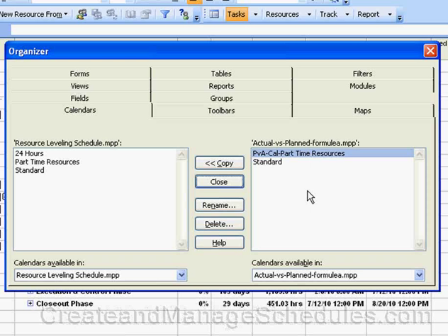And from a management perspective, if your company has different calendars, try and have one resource create and disseminate them, because if 10 versions of a management calendar float around and you grab the wrong one, then of course that would cause some problems. And keep in mind, again, when you name it, you can be creative in terms of how you name these. You can put the project manager's initials in here in each calendar template that you create, if it helps you identify your calendars. So this is how you share calendars.